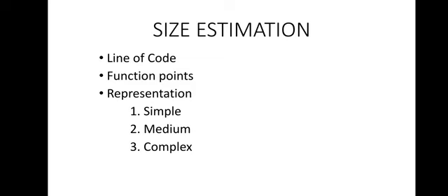Okay, now you can see the third point. This is related to the simpler representation of the application size. So you have to consider number of screens here, number of reports, how many transactions are there. Each of these can be further classified as simple, medium or complex. You can see here, that means simpler representation, medium kind of representation and complex kind of representation.